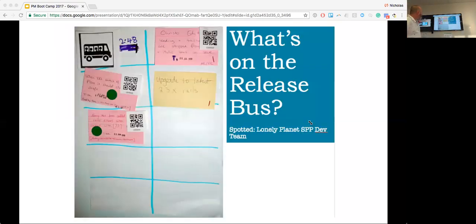Well, you want to release chunks of value in clumps that make sense to a user. If you were rolling out a new version of Netflix, for example, it might make sense to roll out a set of profile changes together rather than a whole series of uncoordinated events. So even in the most agile of worlds where we're doing continuous delivery, there's still a role for release planning, and we use it as binoculars to create a fuzzy picture of the future.